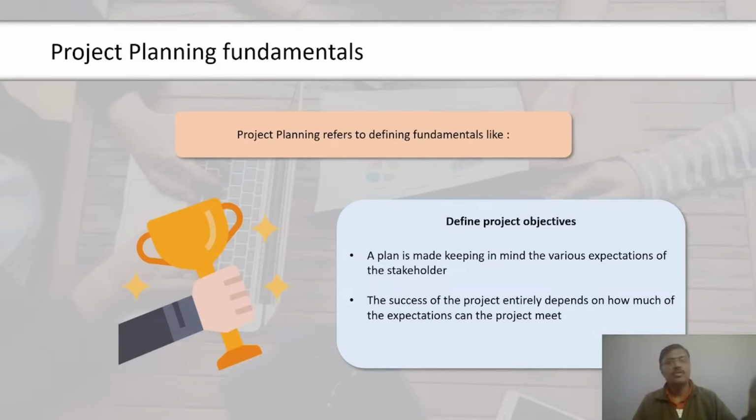The project documentation starts from the point where you create a project charter. Before that, there is documentation in terms of agreements, documentation in terms of business case, many such documents which are referred to while creating a project charter. The project charter will become the first document handed over to the project manager. From then, the project manager will create the stakeholder register, then the scope documents, then risk documents, budget part of it, schedule part of it, then risk, quality, procurement related contracts and agreements, then the register required. All this, because many documents which are created are then referred to and updated throughout the project life cycle, so they are very essential.